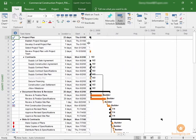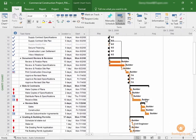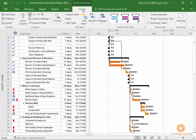So let's start by how do we see the critical path in our project. From here within our Gantt chart view, it's very simple. Within the Gantt chart tools format tab, you can simply select the checkbox for critical tasks.